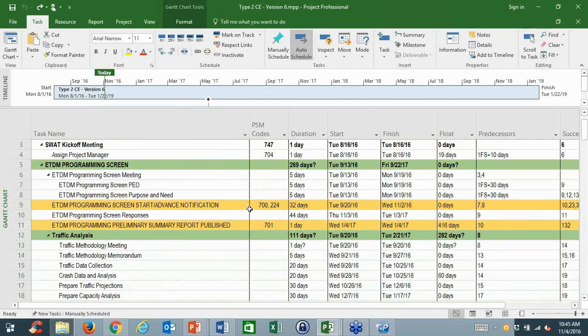Yes. What if a study is added to the current fiscal year by management without adequate time for pre-study activity, to do the pre-PD&E activities? No, you would include those activities. Your starting point would be what your starting point actually is. You're not forced to use these templates. You're forced to use the PSM codes themselves. So you set up your schedule based on the reality of your project. Sure. And if it's going to be a Type 2, an EA, or an EIS, they're also going to go through a screening anyway, regardless of when they pop up.